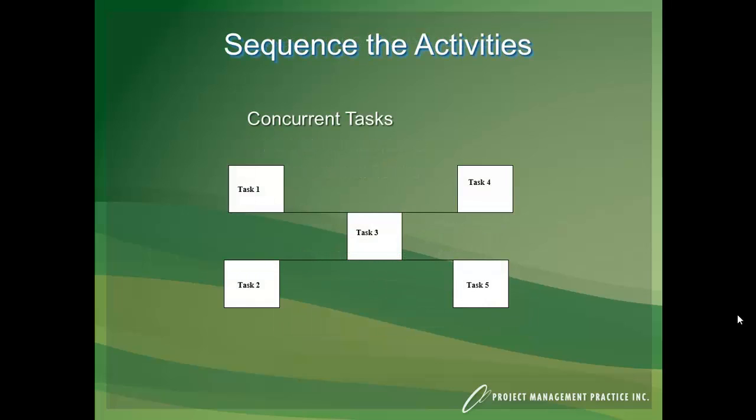Here we have some concurrent tasks, where task 1 and 2 can happen at the same time. Notice there's actually no link between them, and so in this case they'll be driven by the project start date. They'll both have to be done before task 3 can start, so obviously the longer one of those tasks will be on the critical path.